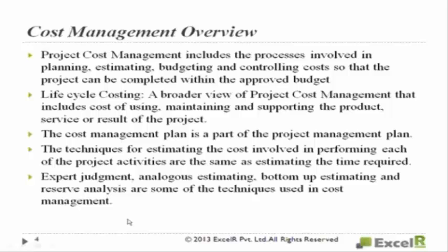So they overlap because of the technique of estimation, the PERT technique, you remember the 3-point estimate: optimistic plus pessimistic plus 4 times most likely divided by 6. So these things overlap in cost management also, because both are estimations. There we are estimating the schedule, here we are estimating the cost.